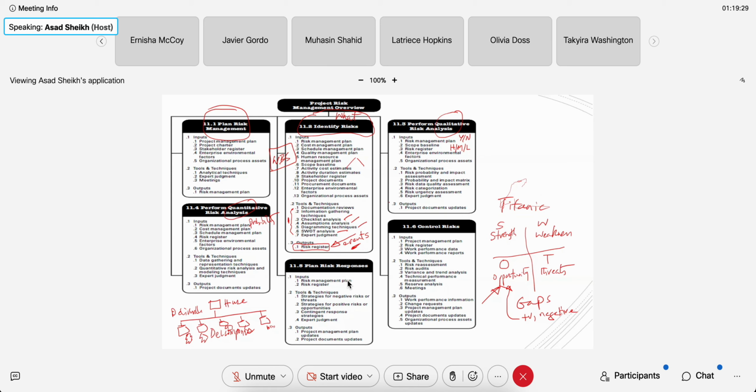All right, so we talked about how we analyze the risks, the two types, qualitative and quantitative. When you're analyzing risk, you don't have to analyze it both ways. Sometimes you don't have data. If you don't have data, then it's always going to fall into the qualitative analysis bucket. But if you have data, then you can say, hey, I've done quantitative analysis also.